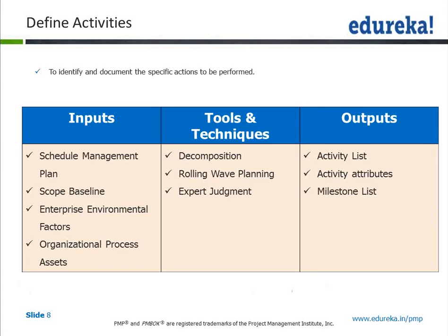So you have to break it down to that lowest level. In the IT industry, if it is a piece of code that you are writing, a piece of code cannot be written by two people for the same program, for the same objective. Hence, that is the lowest level, so you have to decompose to this part.